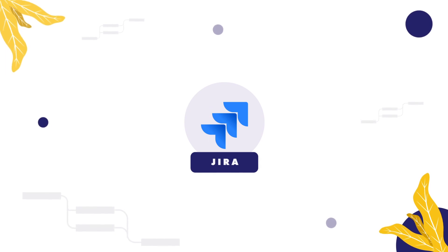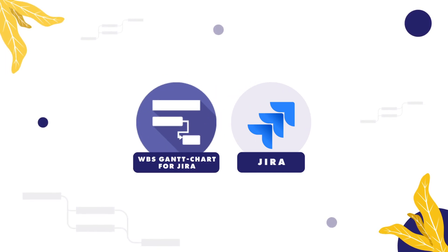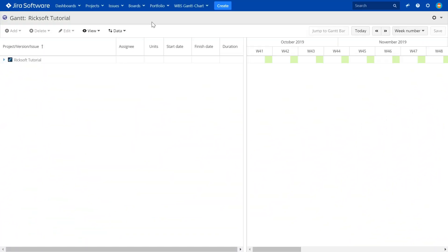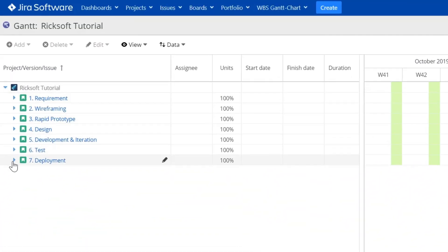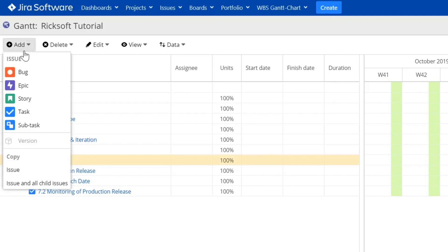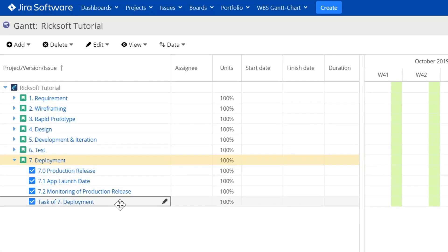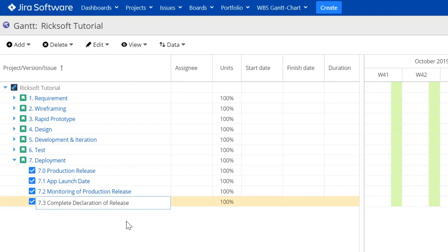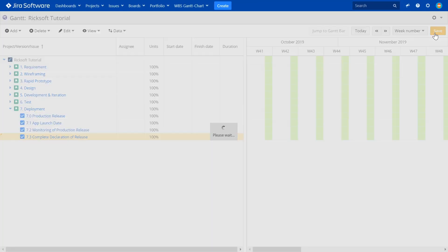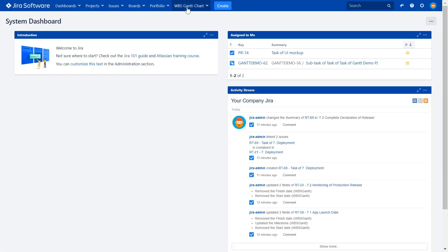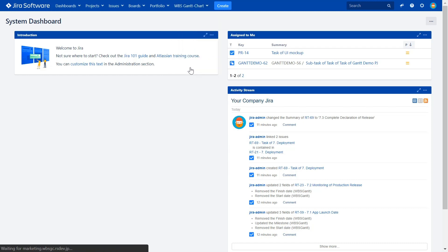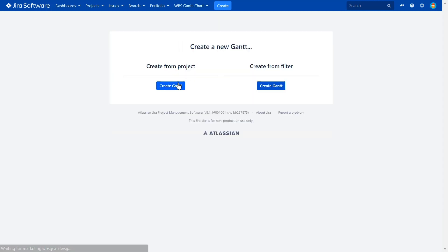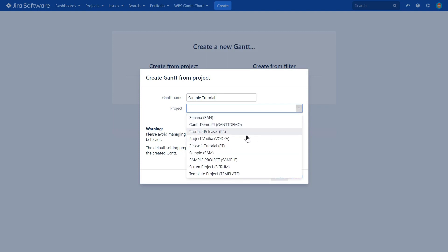To do this, first power up your Jira software with a Gantt chart add-on. Next, break down your big project into smaller deliverables using the work breakdown structure feature. The process to achieve these deliverables refers to the tasks or issues as they're known in Jira. Alternatively, with the app you can also easily export Jira issues as tasks into the work breakdown structure feature, just like this.